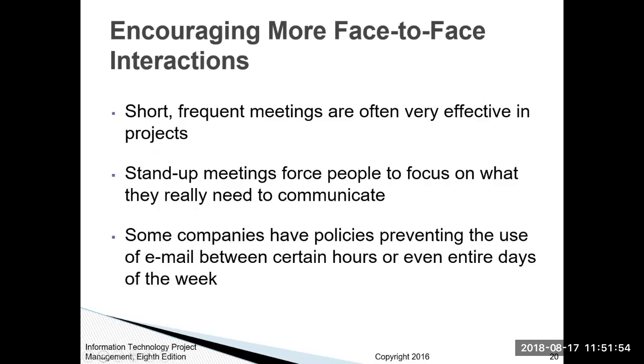Stand-up meetings, which are really popular in the agile environment and project management, this is where it forces people to focus on what they really need to communicate. And technically, on an agile stand-up meeting, a lot of teams will stand up in a circle, and they just kind of go around the circle, and each person explains what they're doing on the project, where they are in the project, if they need something from somebody else on the team, and then they just kind of move along from there.